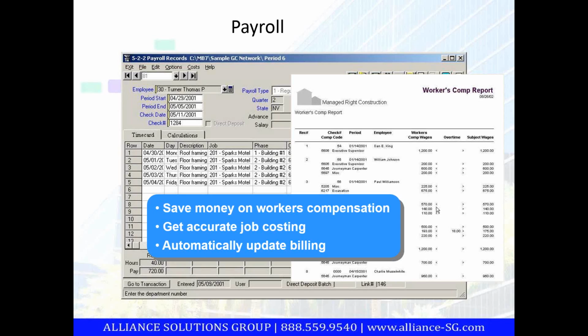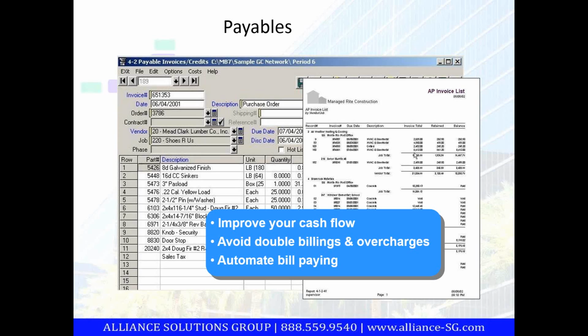It can go a step further. Maybe I didn't do a commitment for subcontracts and purchase orders, but I want to be warned in accounts payable if this invoice is going to make me go over budget. So now I'm getting warnings when I see this that tells me I'm going over budget, which may trigger that this is an overbilling that I didn't account for. So there's various things within our accounts payable that allow you to get control.